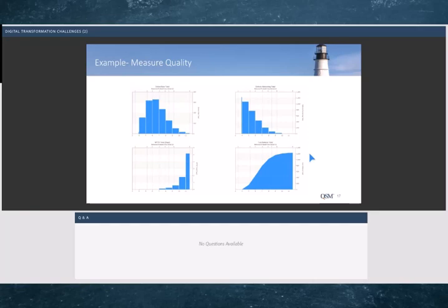So this is going to help us next time we run an estimate for the next release within the same digital transformation program. We're going to be able to see, wow, we had 1,200 defects on the last project or product delivery. Is that similar to what we're about to start? So that we can use that information to help us estimate more accurately. So you see what we're doing here.